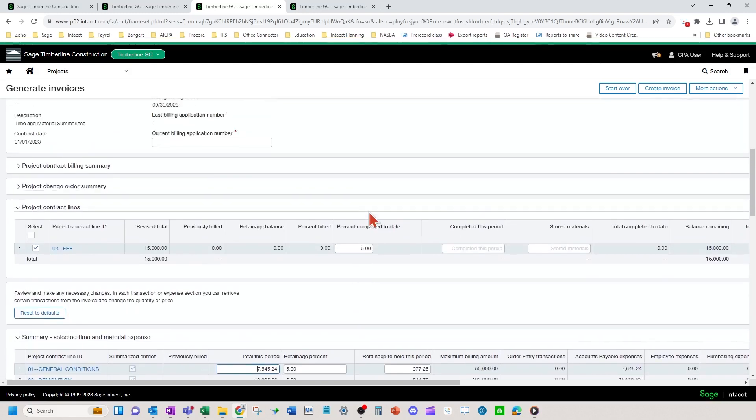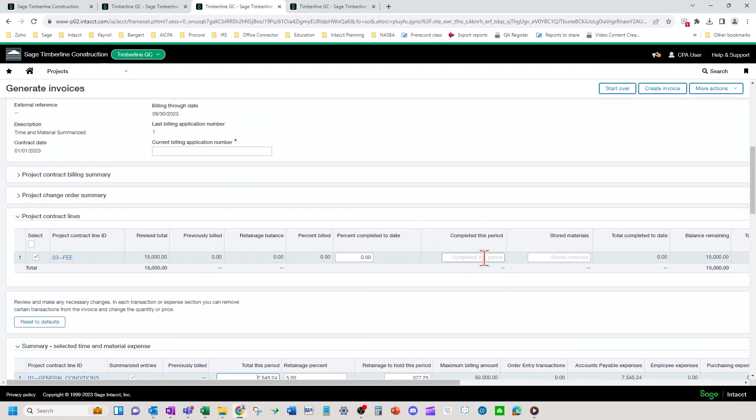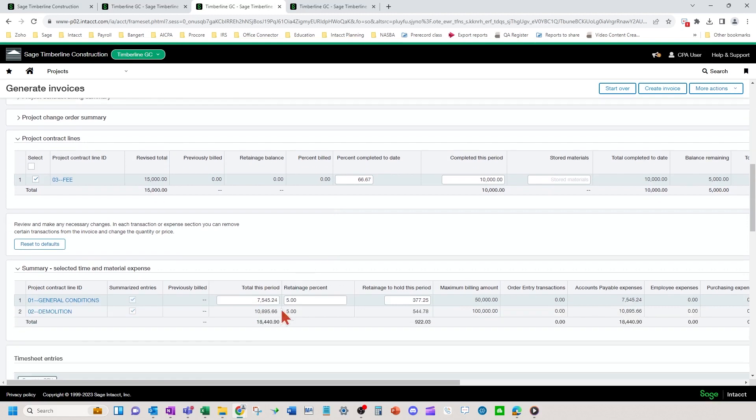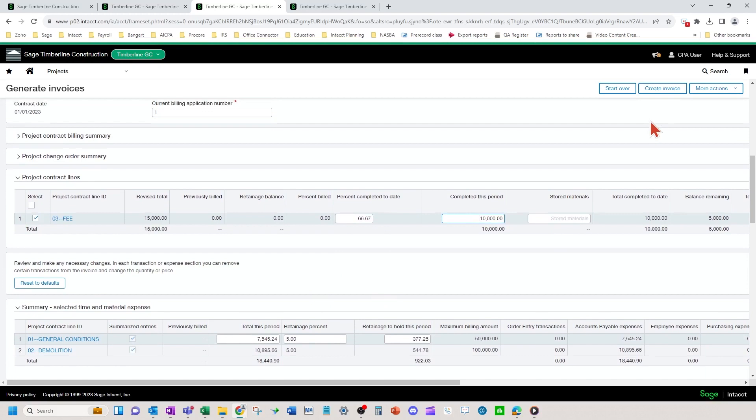And then you would put your fee in, for example, let's do like that. So then we're going to create our invoice. So we've let the costs flow through as they are. We've put a 10 grand in fee on and we're going to create the invoice.